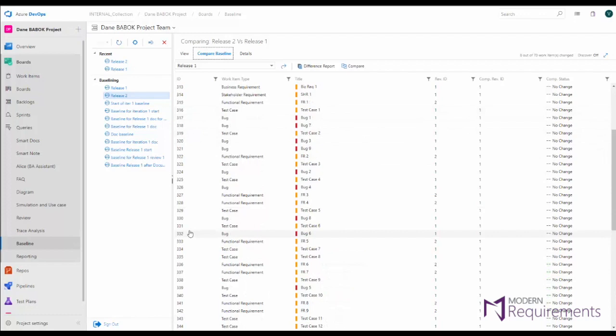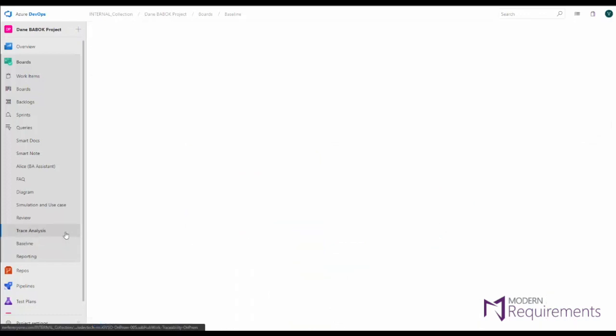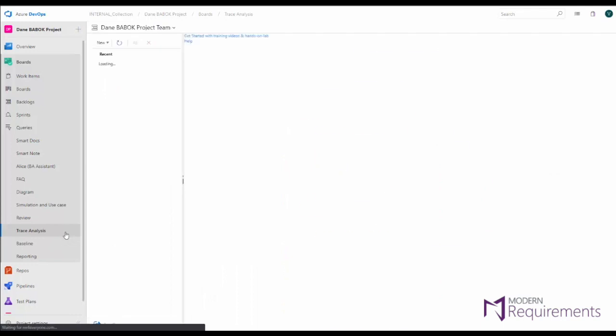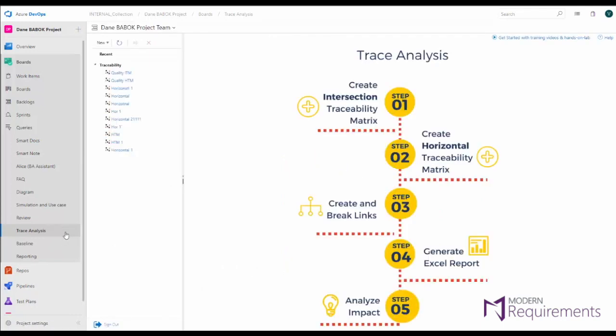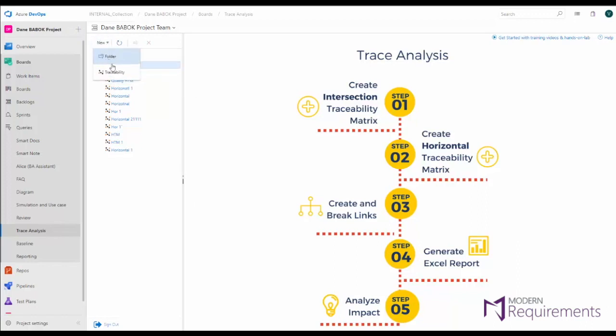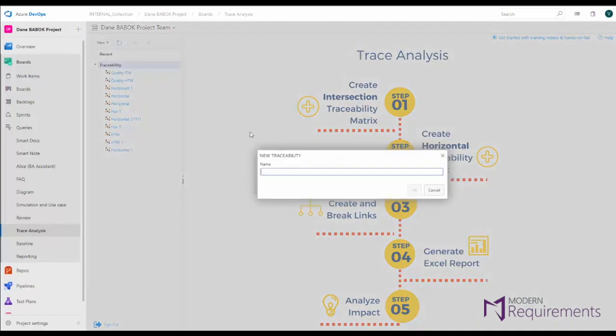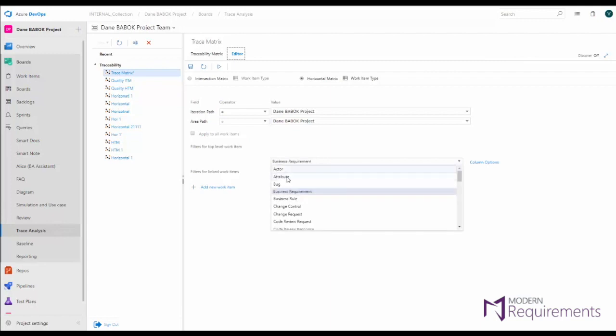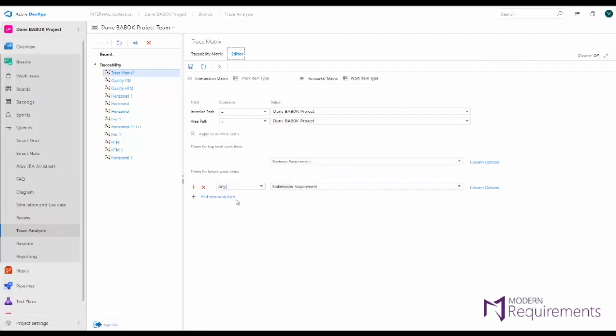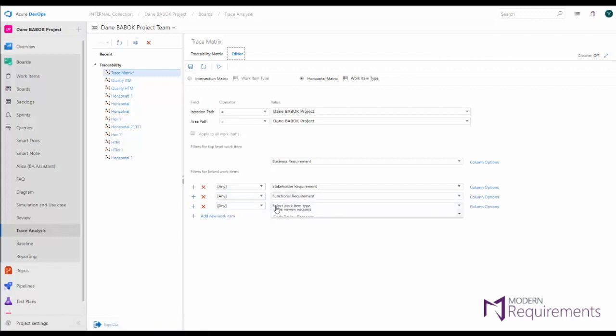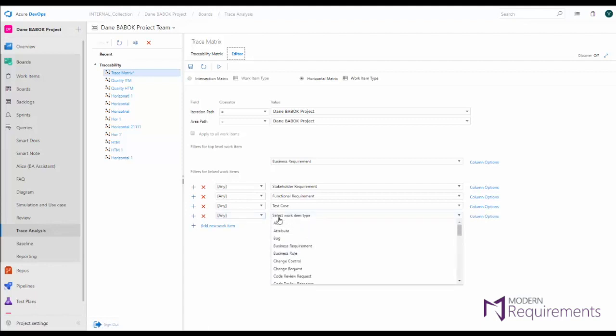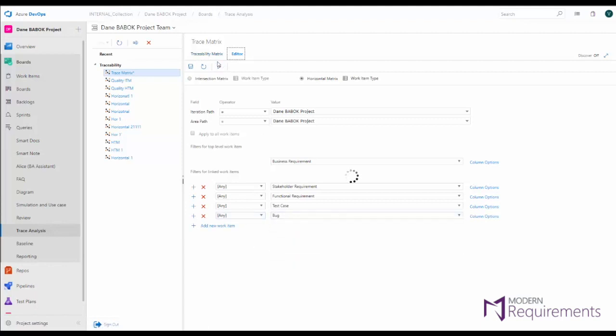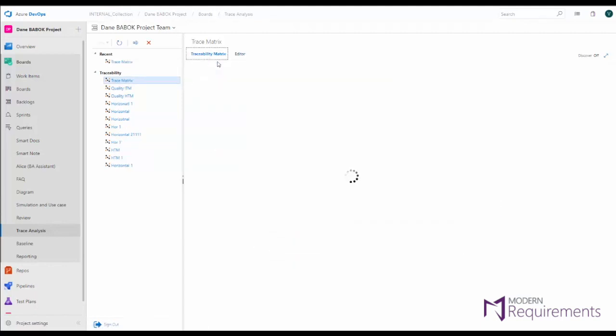And finally modern requirements offers you the ability to trace requirements all the way through your project. So you can build a traceability matrix in roughly 15 seconds that shows you end-to-end traceability of your project and this is incredibly helpful for auditability purposes. So I can go in and make a new trace matrix for my project, call it trace matrix. We say we're going to build a horizontal matrix for end-to-end traceability and I can go ahead and see how my business requirements throughout my project go into stakeholder requirements which go into functional requirements which then go into their test cases and which then show up as bugs. And just like that we create a traceability for our entire project.